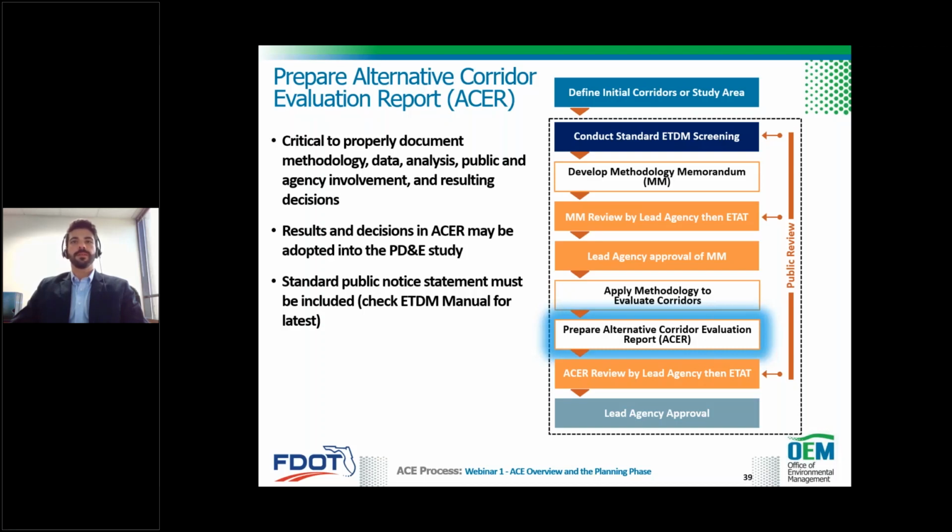Always keep in mind that the evaluation must follow the methodology memorandum, and the ACER document must include the standard public notice statement, which is available in the PD&E and ETDM manuals. This statement is automatically included in the ETDM screening event. As Ted mentioned earlier about Pell, this statement, along with the entire ACE process, supports the adoption into the PD&E phase.